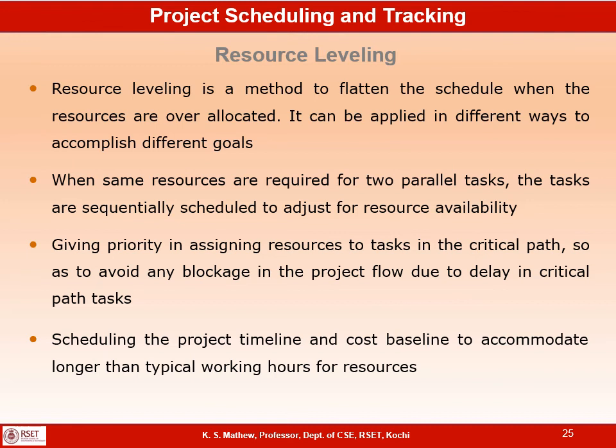So resource leveling I already discussed in detail, and once you complete resource leveling, and if the end date is agreeable to the customer, you can baseline the schedule and start tracking the schedule. And there is an option to baseline the schedule in the MS Project and the Primavera. You need to baseline the schedule once it is reviewed and approved by all the stakeholders. And baseline is